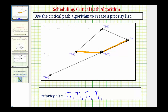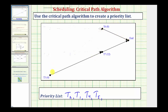Now we eliminate task five from the digraph and repeat. With two paths to consider: from task three to task seven to the end takes 16 hours, while starting at task six to the end is only eight hours. So task three to task seven is our next critical path, and task three is next on the priority list.